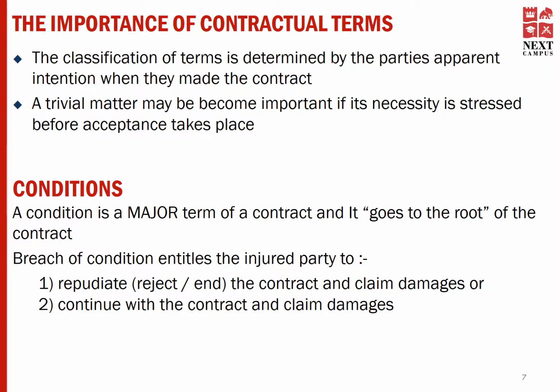Through my experience, I can say when legal people, the lawyers, draft these contracts, sometimes there could be legal wordings that go into a contract which a layman might not understand. So the project manager needs to ensure that there will be a briefing session or an awareness session where all the stakeholders who are not lawyers understand the terms which will be in a contract.